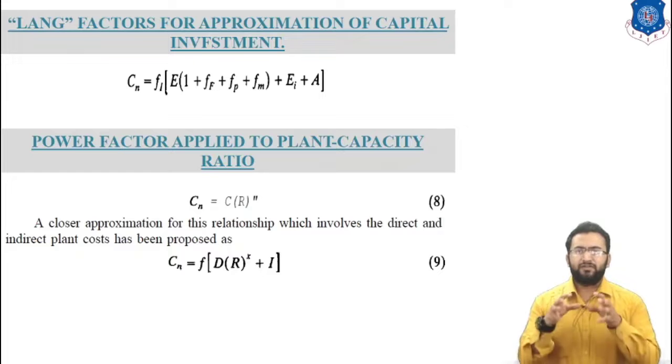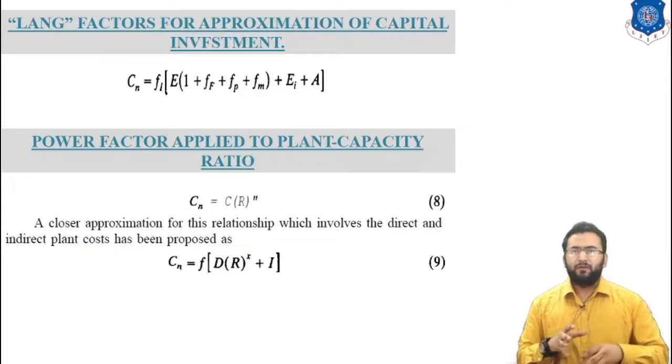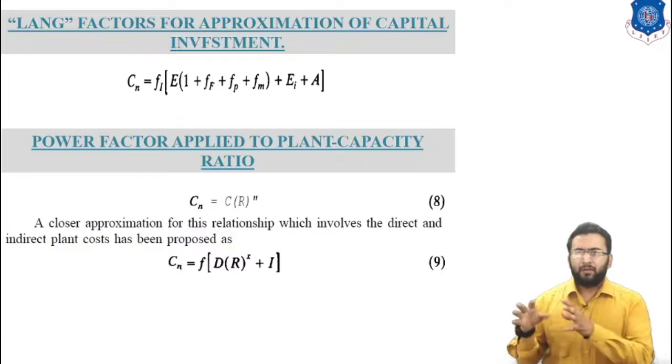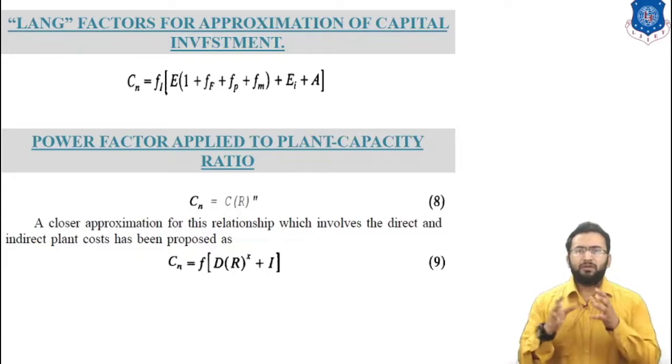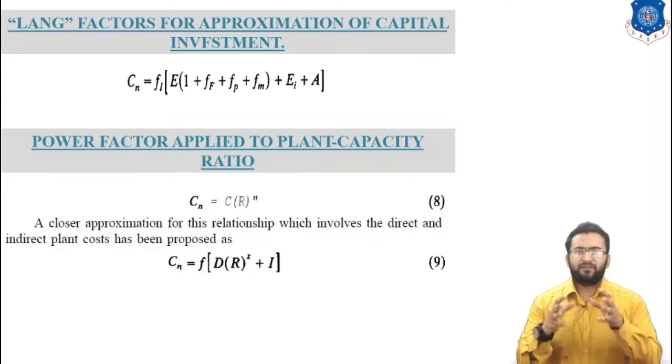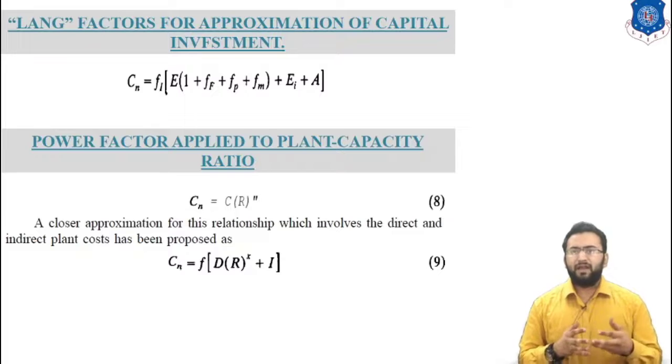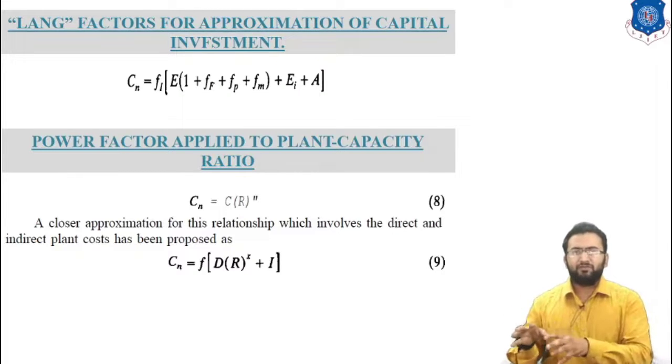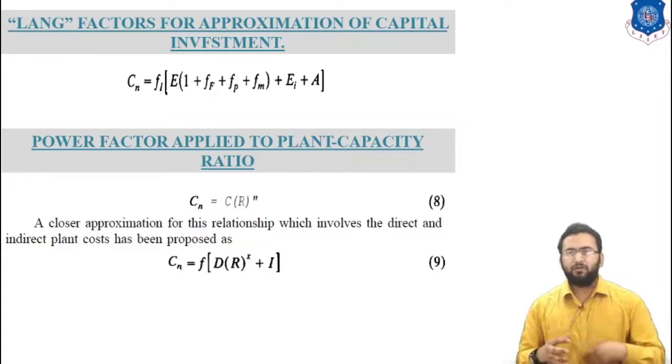Another approach is to separate factors for erection of equipment, foundation, utility, piping, to break out each item of cost into material and labor cost factors. With this approach, each factor has a range of values and the chemical engineer must depend on past experience to decide in each case whether to use a high, average or low figure.